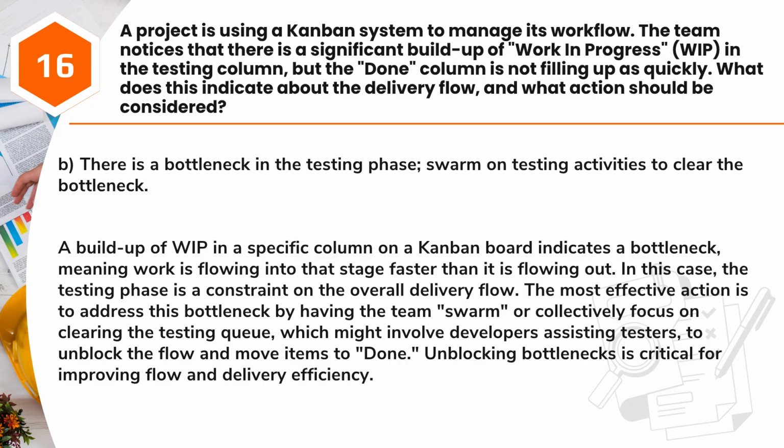The most effective action is to address this bottleneck by having the team swarm, or collectively focus, on clearing the testing queue, which might involve developers assisting testers, to unblock the flow and move items to done. Unblocking bottlenecks is critical for improving flow and delivery efficiency.